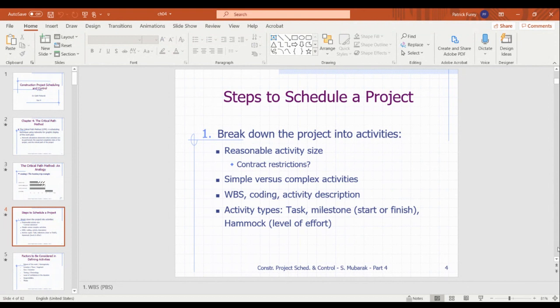Milestone is a word you often hear in a construction project, and it's pretty self-explanatory in this context. A milestone is a defined point that you can use to gauge: are we behind schedule? Do we have some opportunity to cut some days out of the schedule because we completed our milestone? Milestones can also be a precedence for some other task, or not even a task, something not schedule related. It could be logistically related for the project. Certificate of occupancy is often a milestone.